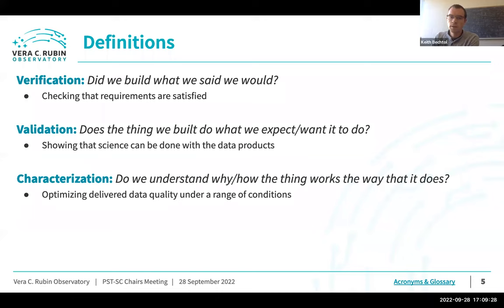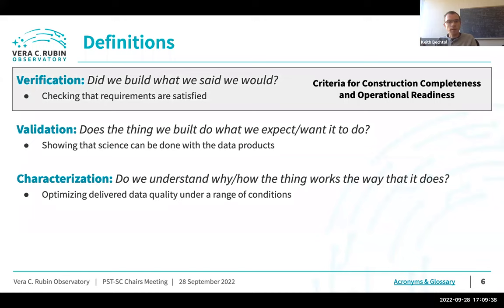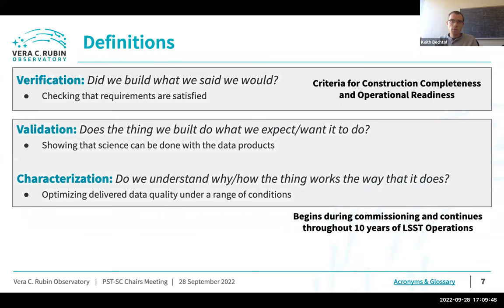In terms of definitions: verification is basically asking whether the as-built product meets the specifications — this defines our criteria for construction completeness and entering operations. There is also validation and characterization, which begins during the commissioning period but continues throughout the full 10 years of LSST operations and beyond. This gets at questions like: what science can you do with the data products, is it meeting user expectations, and do we understand in detail how the observatory works?